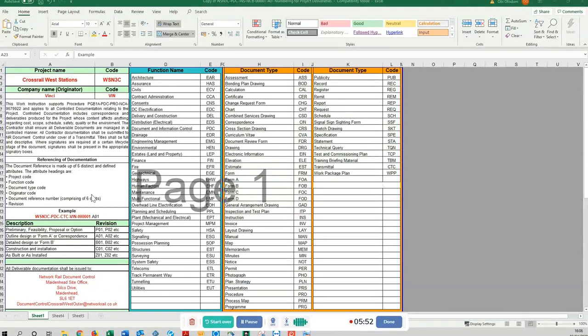up rev. That's the language we use. You up rev it, meaning you give it a new revision to indicate that this is a new version of the old document, because a change has been made to the document. And so we send the document back to the client so that they can see what these changes are as per their requirements or comments. But it now has a new identity, which is the new revised content in there.